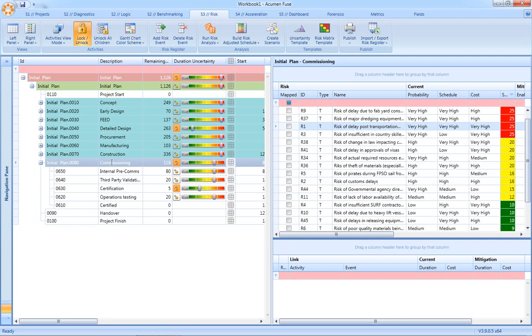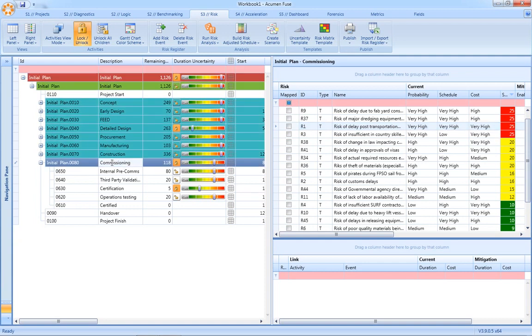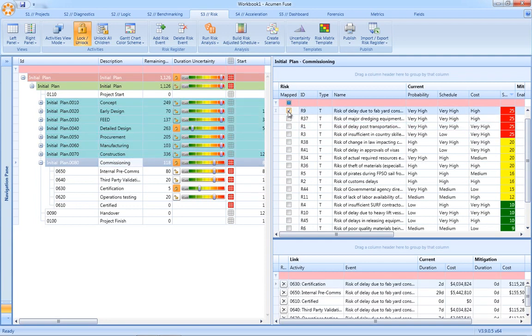In terms of risk mapping, you simply select the activity or the groups of activities and then the corresponding risk event and Acumen Risk will automatically map that single risk to, in this case, multiple activities within the commissioning WBS.